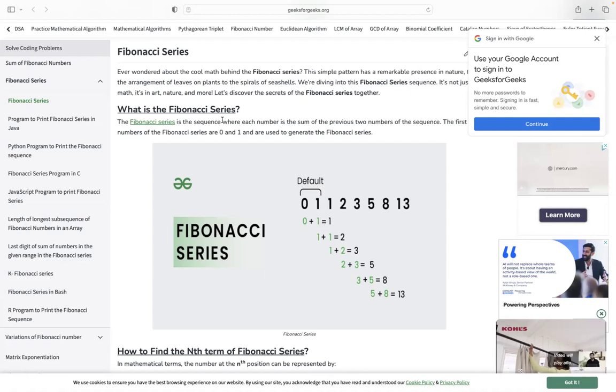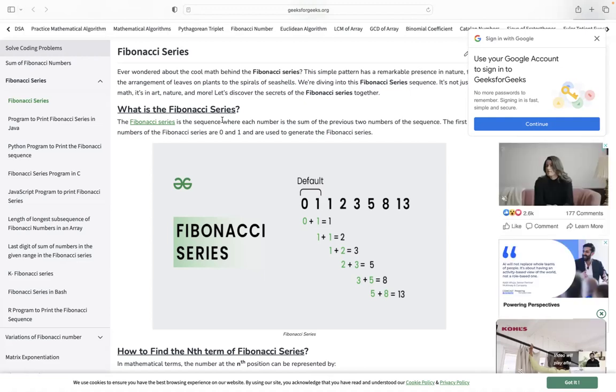As you can see, you can't just go up to the next number in some situations. So it takes a little bit of discussion when you want to determine if something's a 3 or 5 or a 5 or an 8. With lower level estimates, typically it's easier for people to hash it out, but it seems like not having the 4, the 6, and the 7 option leads to further discussion. So just be mindful that these are our options as we estimate going forward. Coach Britt, you can go ahead and jump back to our Jira instance.